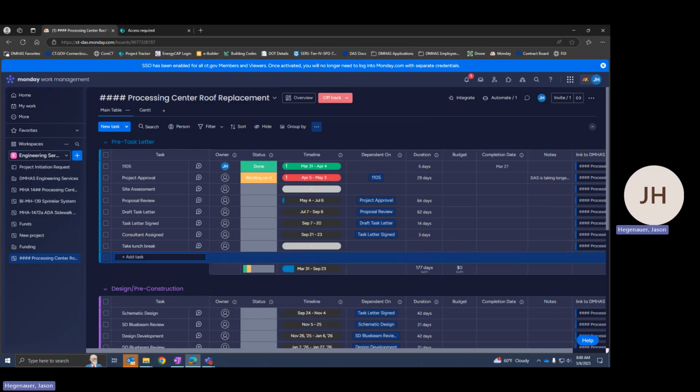Again, extending a timeline will push dependent tasks back, but shortening one will not bring them forward. So I'll start at the top and set my dates by clicking in the timeline for each task and selecting the date that is after the previous end date.